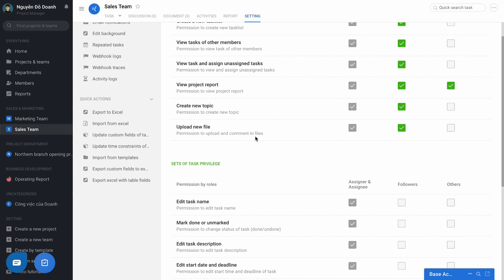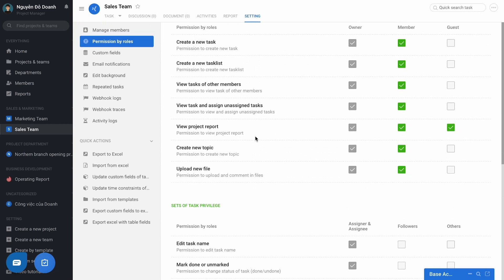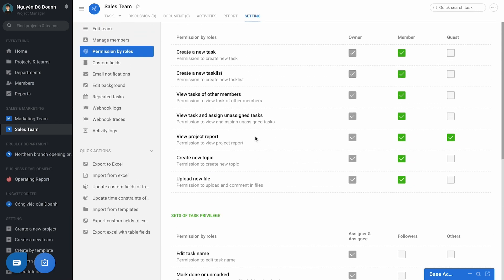And the most importantly is the permission by role section to configure the privilege of the member of this project or team. Typically, the ability of whether or not let the members see each other's task as the right to view task of another member.